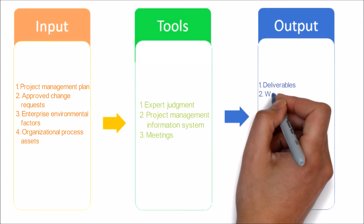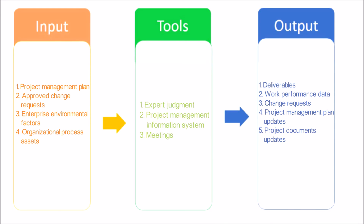Now let's see the outputs of this process. Deliverables. Work performance data — work performance data are the raw observations and measurements identified during activities being performed to carry out the project work. Change requests — a change request is a formal proposal to modify any document, deliverable, or baseline. Project management plan updates. Project documents updates.